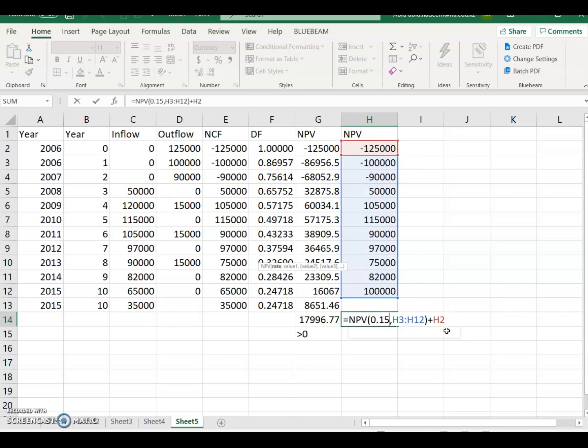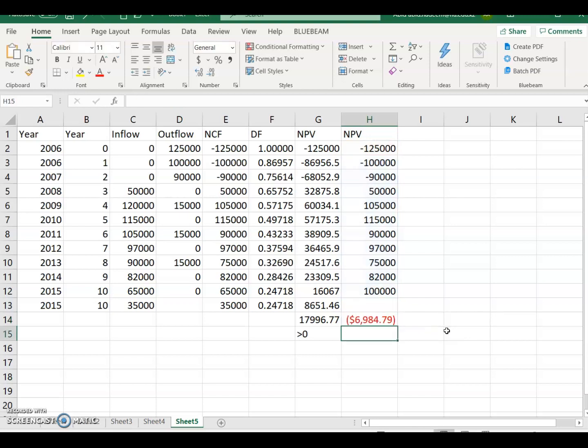So now the hurdle rate is 14%, so the total of the rate will be 17%. 3 plus 14 is 17%. So now this value will become negative. A negative value will show that the net present value is negative. So it means that the project should not be accepted, because net present value will be negative in this case.